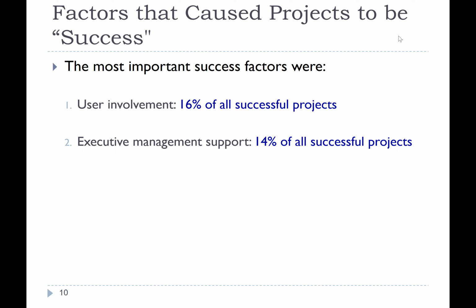So what happens in a lot of projects as well is that the last increment is supposed to be paid when the project is completed. Usually clients will say, okay, I'll pay you next week, I'll pay you the week after, I'll pay you next month, next year. And then it keeps dragging on and on. So neither client nor vendor are angels in this regard. As an academic, as a professor, I'm supposed to say that you should uphold your ethical and moral values throughout this whole process. God be with you when you actually do hit the industry, because you're going to see this nasty work happening. And I'm glad I'm working at a university so I don't have to deal with this.